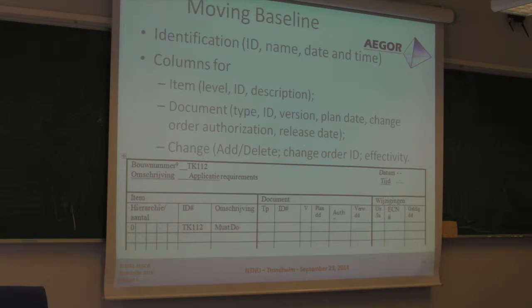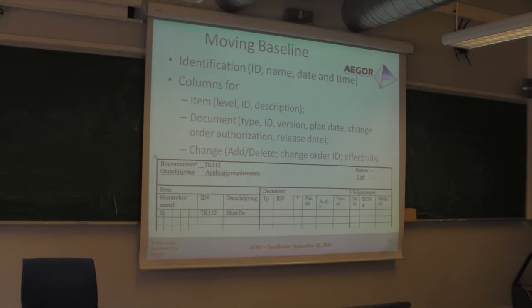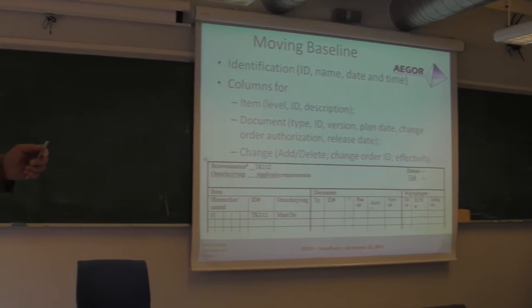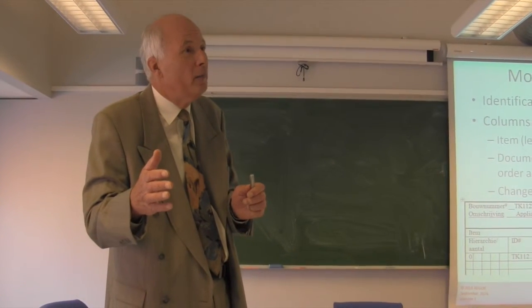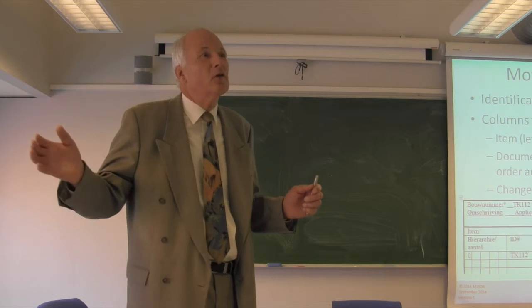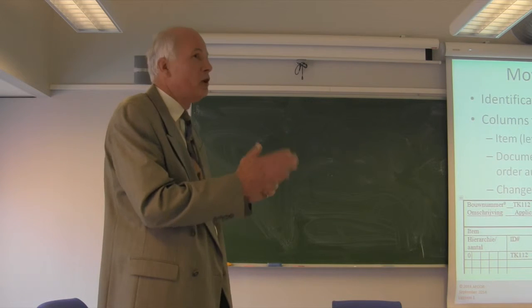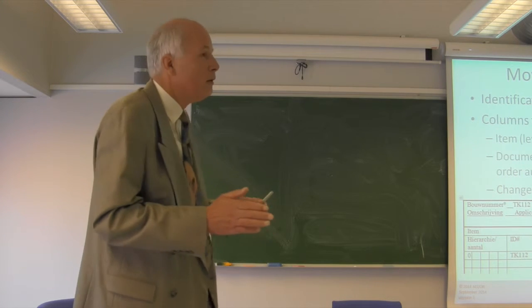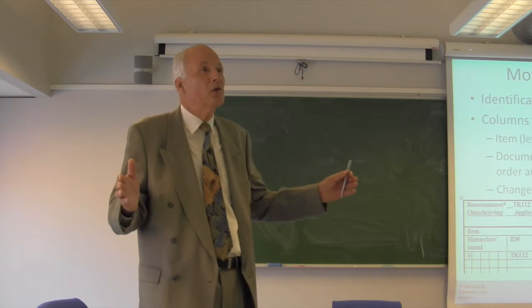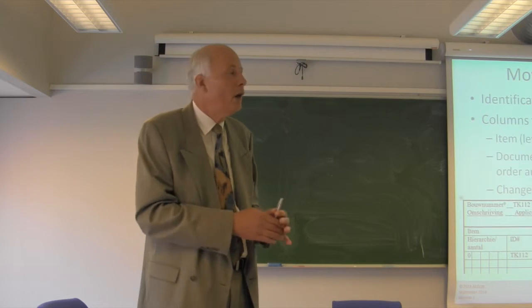You have a design baseline, you have a concept design, what is in the front, you have an engineering baseline, what is going to production. Many times production has their own baseline, the manufacturing baseline, and so on. But the disadvantage of fixed baselines is you don't know the actual situation between these points.